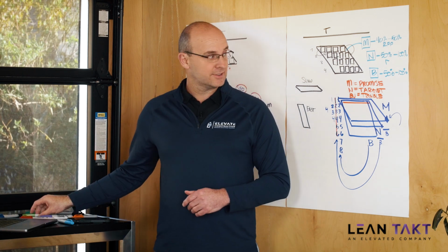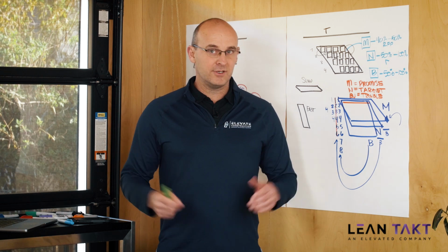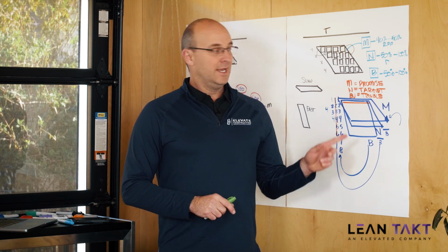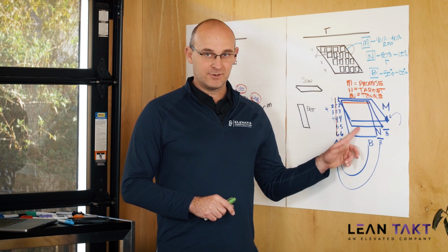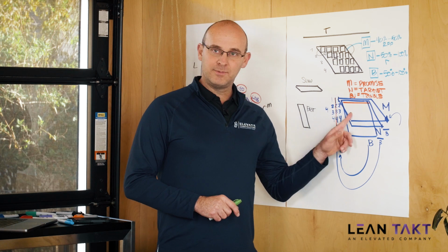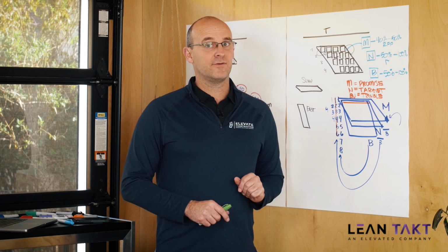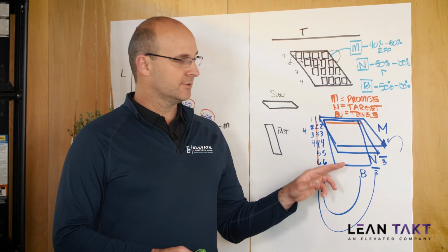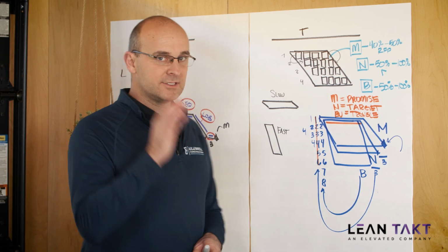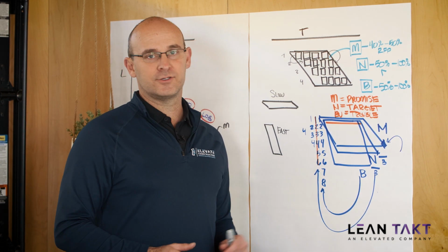Now, let me just say a couple things here. You're probably thinking to yourself, Jay Money, I love this, but you're talking about different schedules. I thought you didn't advocate having different schedules. These are not different schedules. This is the same schedule, the same crew size, the same trade, the same crew composition, the same plan, the same amount of work, the same area, the same everything. The only thing that's different is when you would need materials, because if you're going faster, you obviously need materials sooner. So this does not hurt trade partners. It doesn't hurt trades.